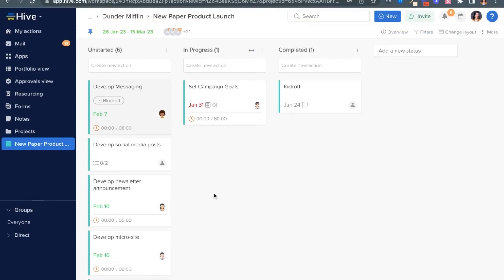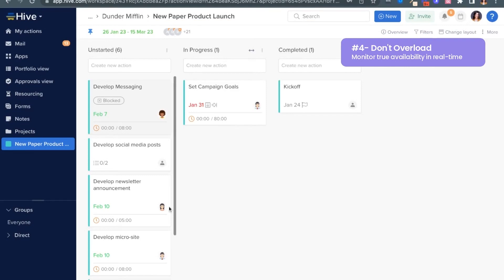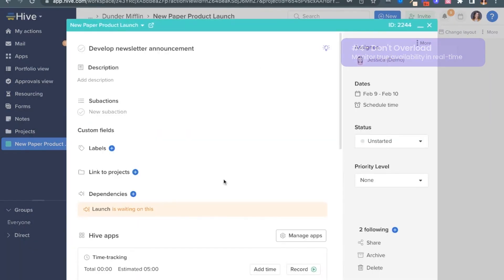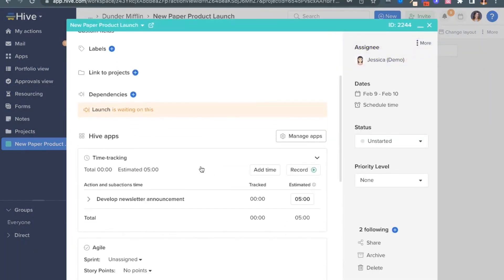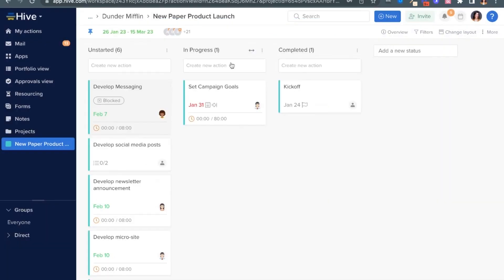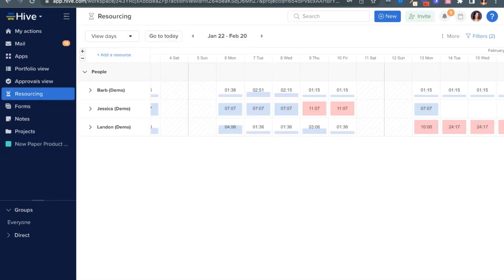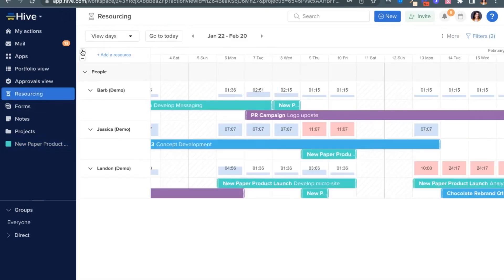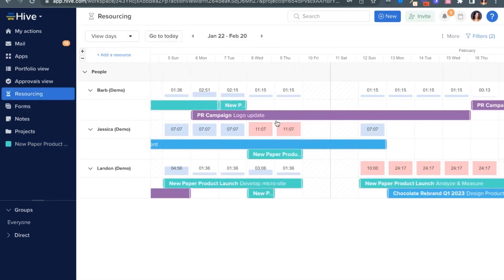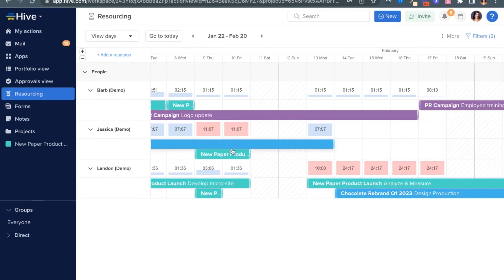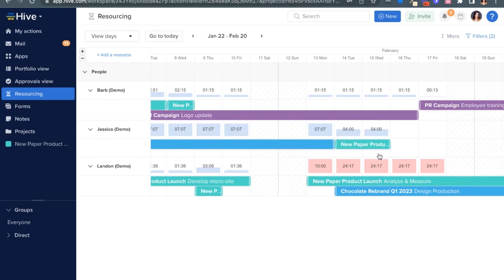Our fourth tip to keep your agency humming is to plan your team's time effectively and avoid overloading them. Here's an example. This task is estimated to take five hours. Or rather, make that eight hours, let's change it. Now head to resourcing and see how this all looks against the available hours in a day in each person's schedule. Here you can make informed decisions about everyone's workload and see who has availability and when.